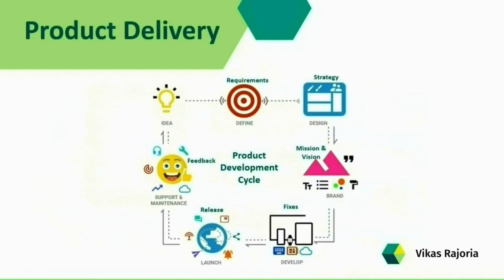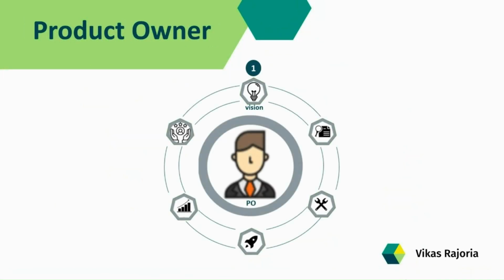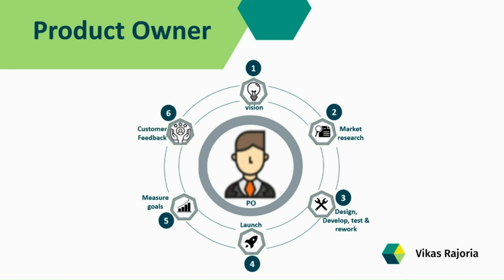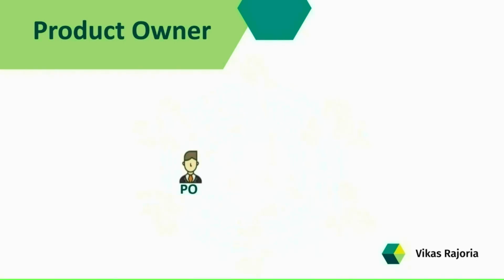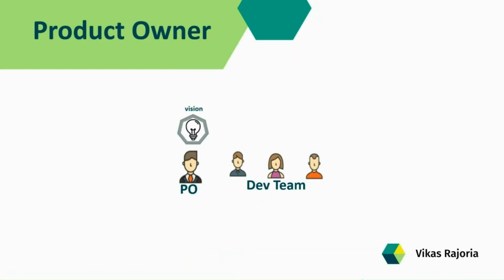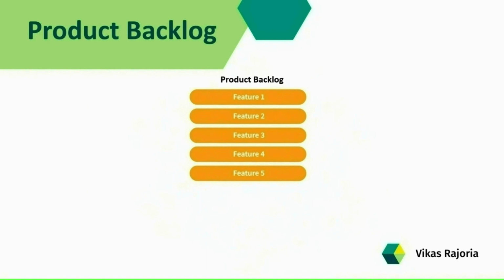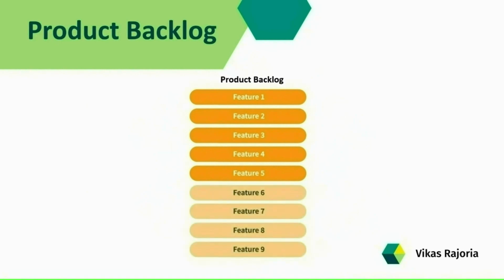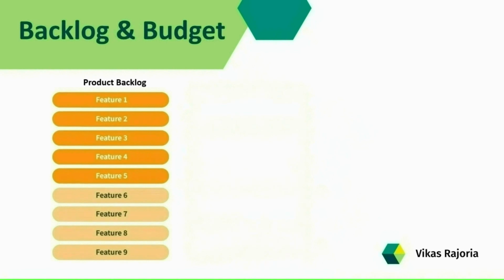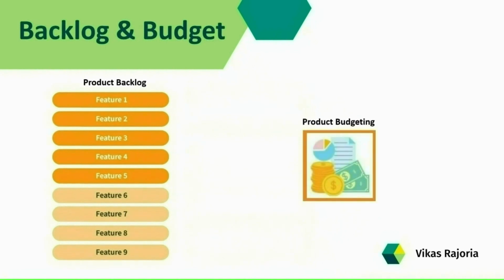And at the same time, he ensures that the application is built exactly in the way it must be built. So we can say the product owner is primarily responsible to turn a project into a successful business product in order to satisfy customers' needs and maximize the ROI by determining the product features. Meaning the product owner communicates the product vision to the team on a daily or weekly basis. So the product owner is responsible to maintain the backlog items. He defines and reprioritizes the backlog items, and he works on project piloting as well.